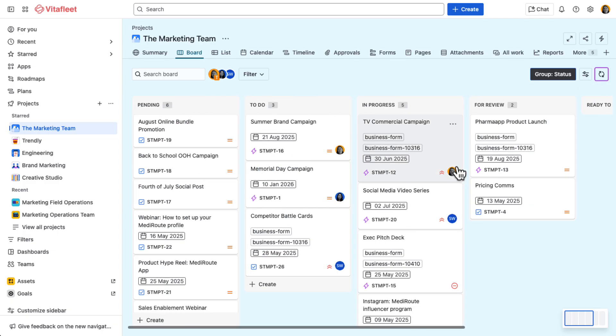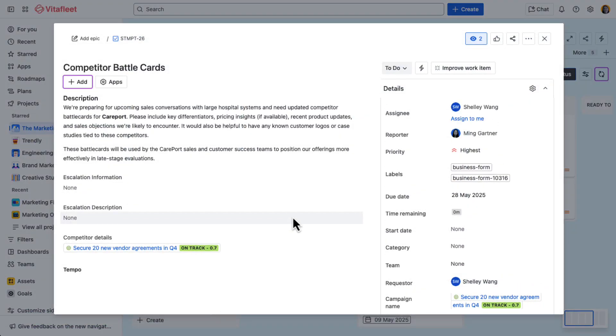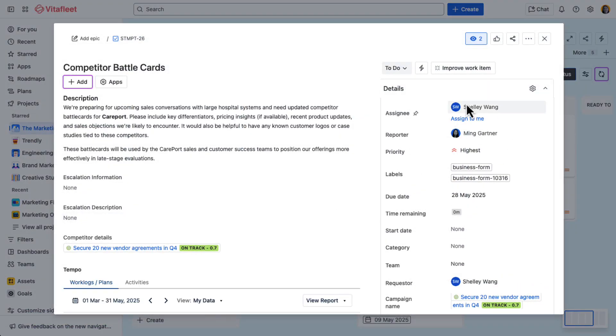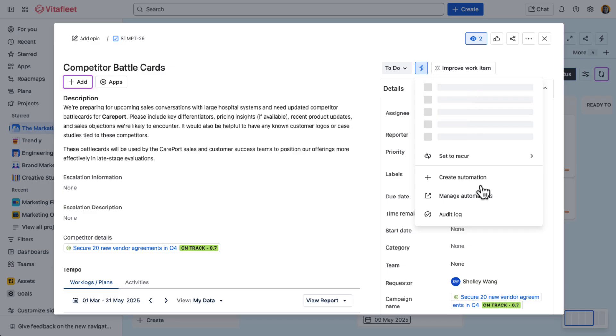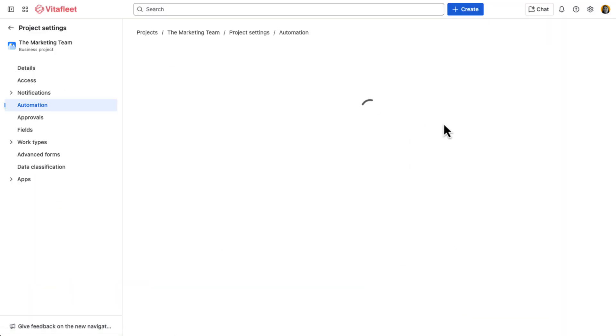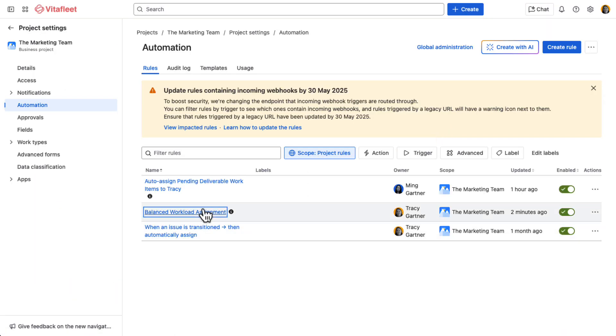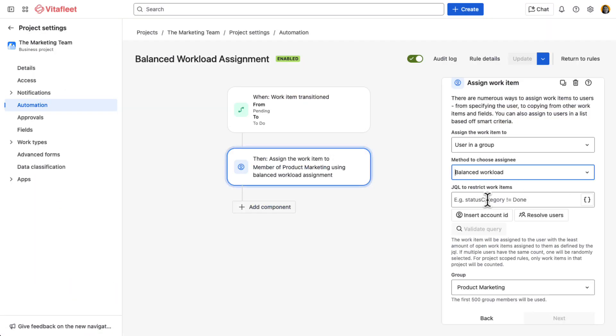As soon as the request is moved to to-do, Jira automatically reassigns the task within the marketing team. Thanks to a balanced workload automation rule, the work is assigned to the team member with the most capacity, so nothing falls through the cracks.